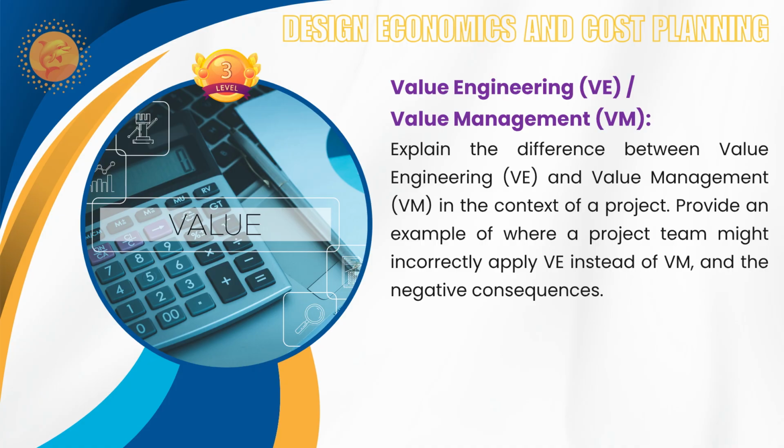Actually, in one of my projects, during the construction stage, the building was supposed to be G+4. Due to some authority restriction, nearby metro or something, it got approved for G+3 only. So then the client, I mean, we did a VE or value management, what it is called, I'm just thinking about it. So the parking area we utilized, and the flats which were supposed to be in G+4 were managed with that.